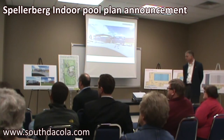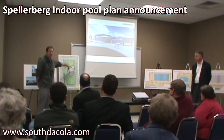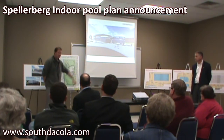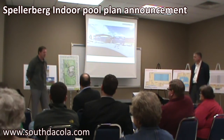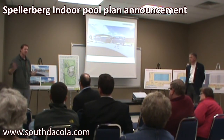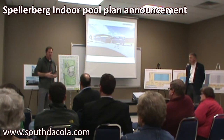Once the activity starts in late April, early May, you're going to see trucking. This is going to take a couple of weeks of trucking, and they're going to be consistent. We'll come over here south and then exit on the 26th. That trucking will be consistent all the way through May for the excavation. At that time, you're going to see the traffic change from dirt work trucking traffic to periodic traffic of the concrete guys, concrete trucks coming in. The pours on a project like this, all the way through the summer, are going to be